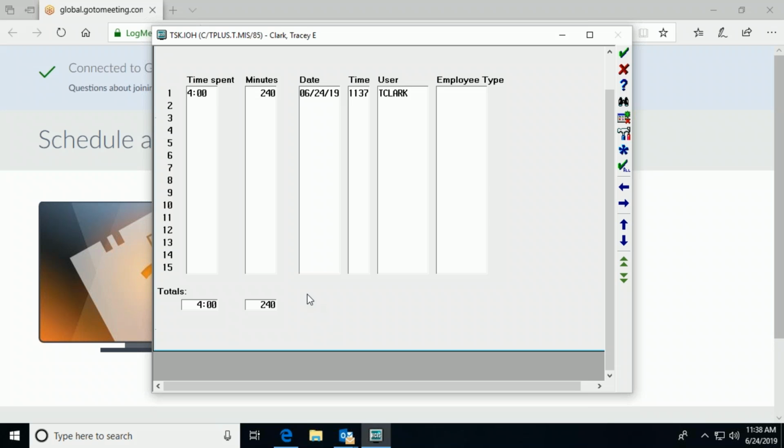I've just been reading documentation for the last hour, and I would even go as far as to say, if I spent the last hour reading all of my release highlights documentation, I wouldn't necessarily feel like I had to go into every single task and put in 5 minutes. I would just open up one of my tasks and put 1 hour. Because usually when people are trying to gather statistics about the resources required, how much time, they're usually interested by the user or by the module, not really by the individual DTS. Is that a fair comment?